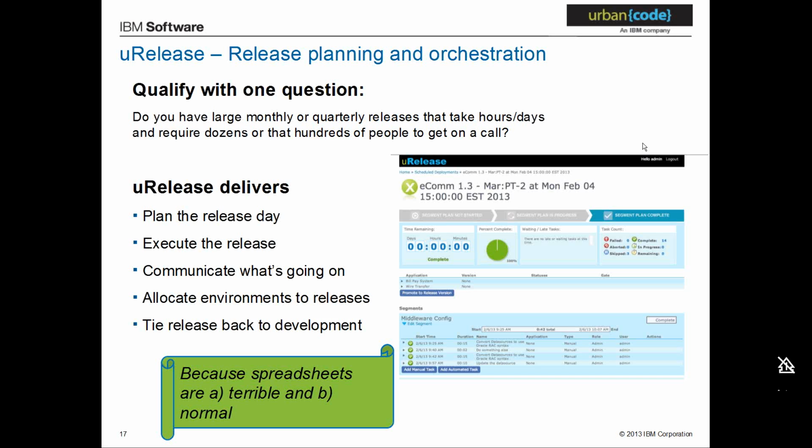When we talk about releases, there are different phases in a release. It typically begins with the development phase and ends, let's say, with the operations or deployment phase. Between these two there are a whole lot of phases. As you move from one phase to the other, as you promote an environment, there are some exit criteria, and you actually have to have an audit trail on those exit criteria. Let's say you move from the development phase to the testing phase: were the things taken care of, who did what, that kind of bird's eye view.